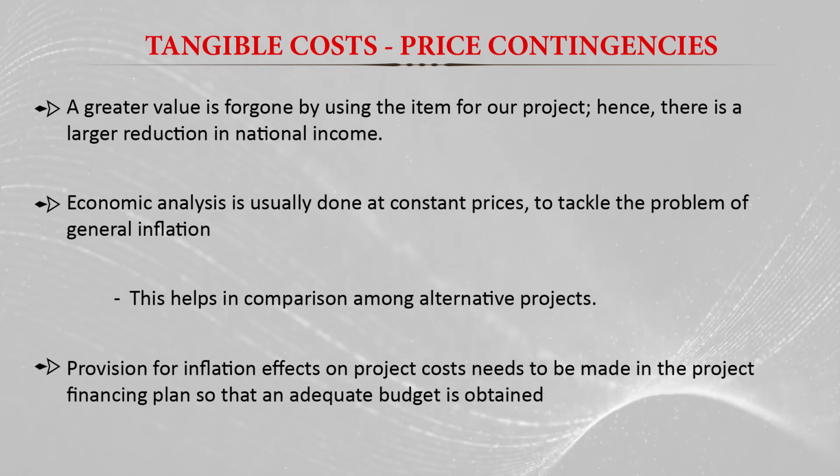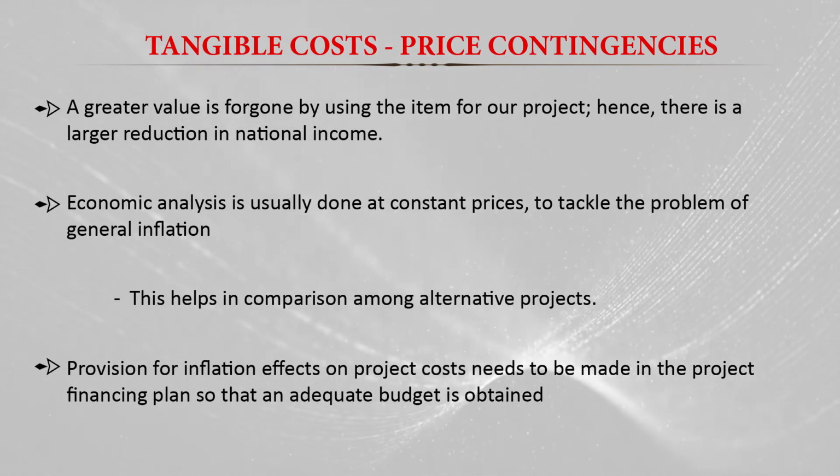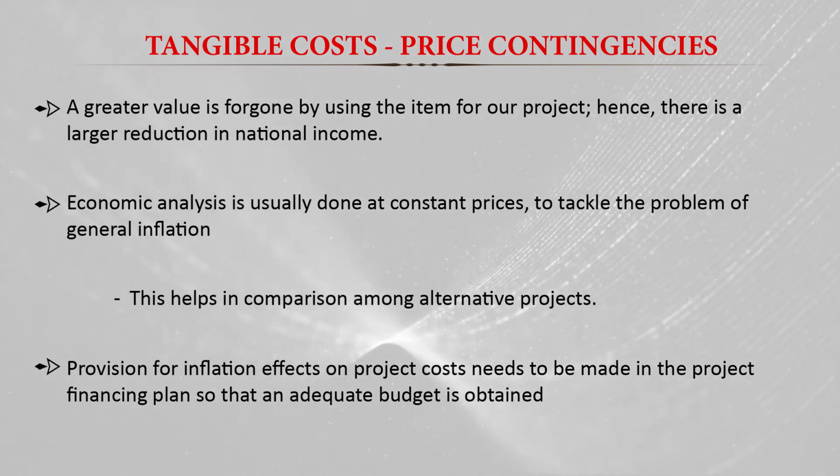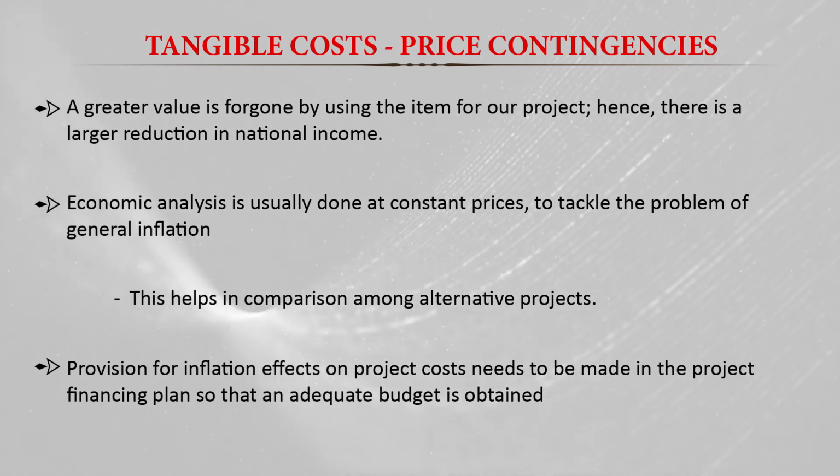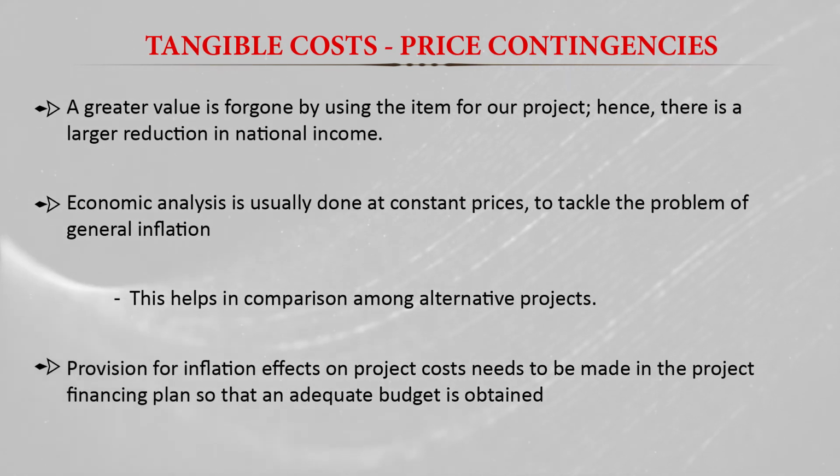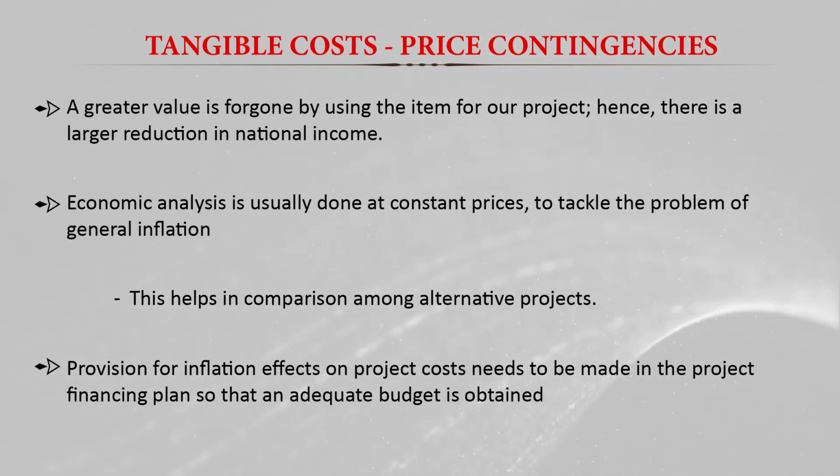So actually we need to make the provision of the inflation in the budget itself, so there is no problem while implementing the project. So many times we have heard that when there is a delay in the project implementation, the cost of that project increases because there is an inflation effect on the project cost.